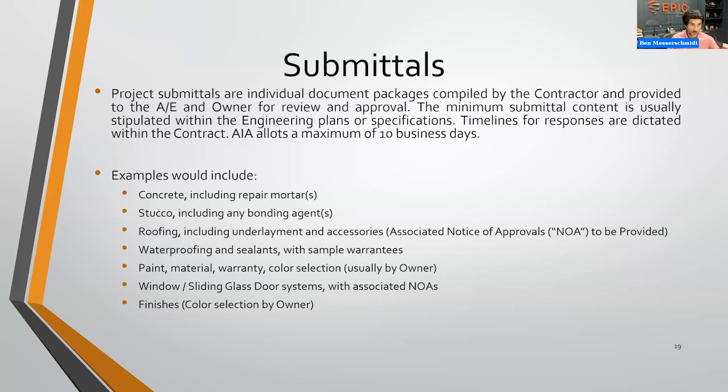Now, there are varying levels of warranties. You can have something as basic as a material-only warranty, meaning that it's only going to cover the actual material. And the best example I have for this is going to be a planter. A box planter that has a large royal palm in it, so a 40-foot palm tree in there. You did the waterproofing not too long ago, and your warranty only covers the material. Now the planter starts leaking. You don't know why, but you're going in to investigate to go ahead and figure out the why,